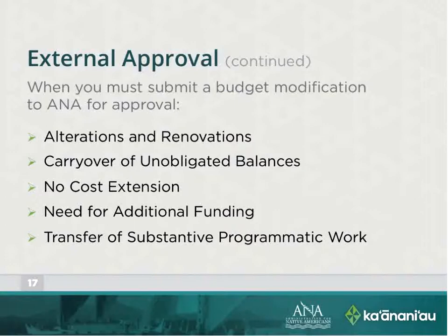That's the first thing we do: we look at the final 425 to see if it's there, and we go to the payment management system to see if the funds are there and that both pieces of information match. If they don't match, then that just halts the whole review process. Grantees should submit their carryover request as soon as possible in the current budget period.